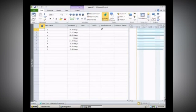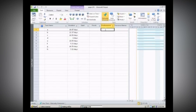Let's start looking at how we might create the picture of our project — how we might be able to create that Gantt chart to show us which items have to come first, which are the predecessors, and what things we might be able to do in parallel with each other. We would not put anything for task 1, simply because it is the starting task and there's no reason for it to have any predecessors.